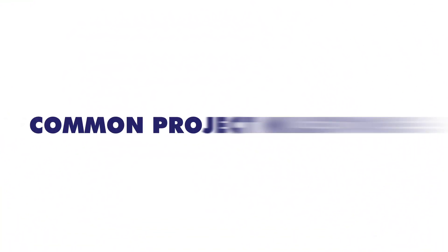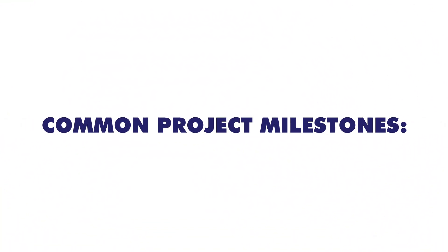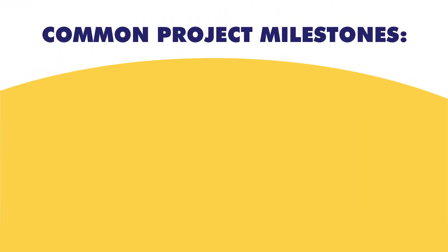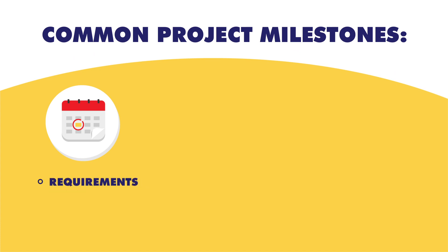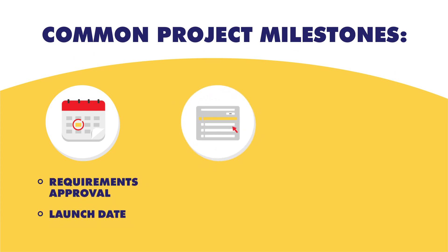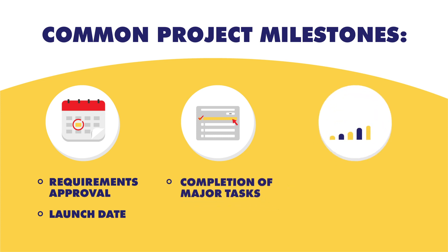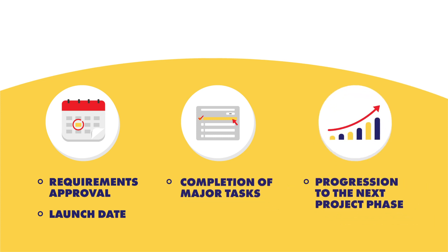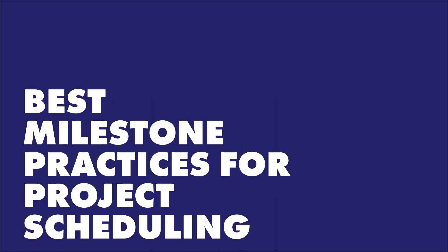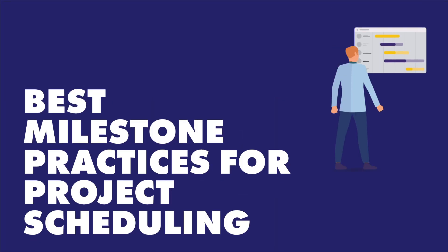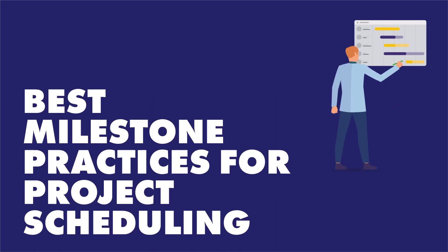You should then be able to narrow down relevant and critical project milestones. Common milestones in a project are critical points like requirements approval or launch date, completion of major tasks like product prototypes, and progression to the next project phase. Keep these key considerations in mind before you use milestones to schedule projects.